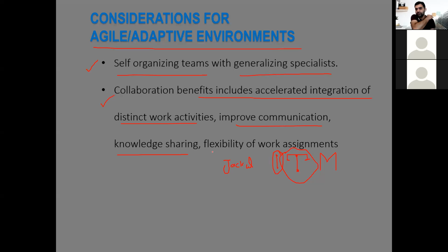So there are some requirements that Agile highly recommends. For example, Scrum, one of the methods of Agile, says that teams should be dedicated. They should be working 40 hours for your project. They should be co-located so that there is good collaboration among the team members.